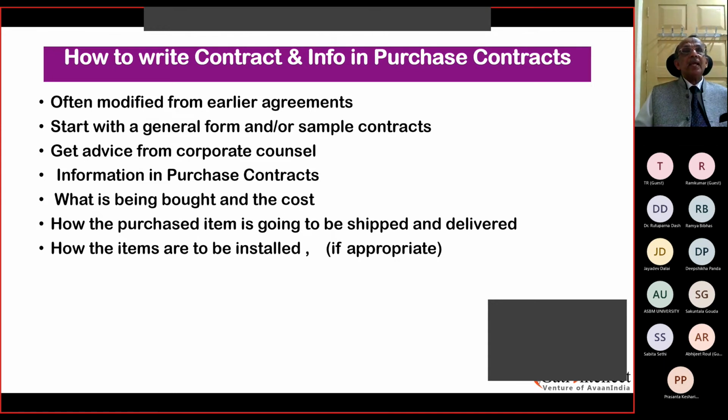But being a very reputed organization in Saudi Arabia, we had to comply because it's our reputation which matters. So at our additional cost, we had to mobilize cranes on 2 sides, lift it from both sides, take it up to the first floor and place it onto the foundation. This is the lesson which we learned.